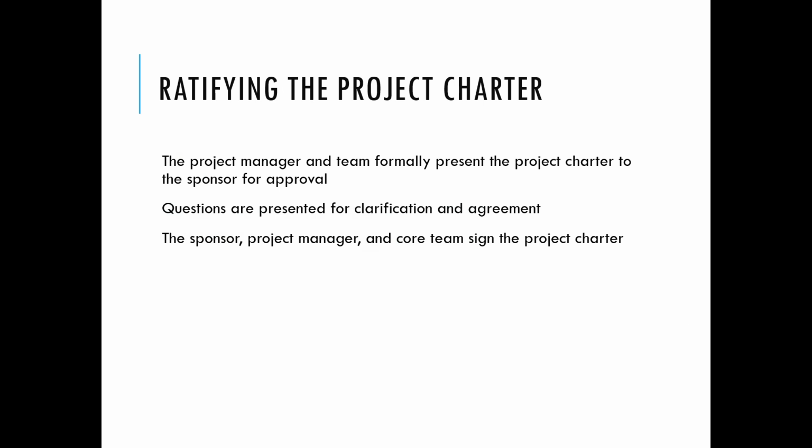Finally, the project manager and the team formally present the project charter to the sponsor for approval. After all, the sponsor approves the project charter and has the final say. Questions are presented for clarification and agreement, and the sponsor, project manager, and the core team sign the project charter.